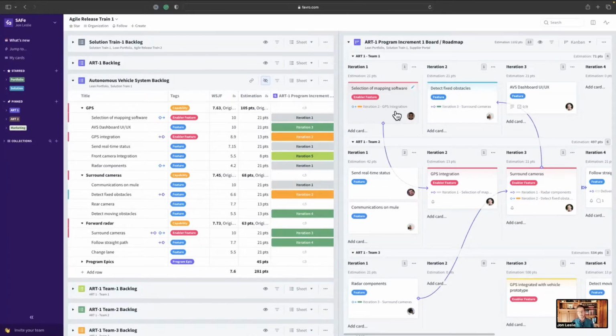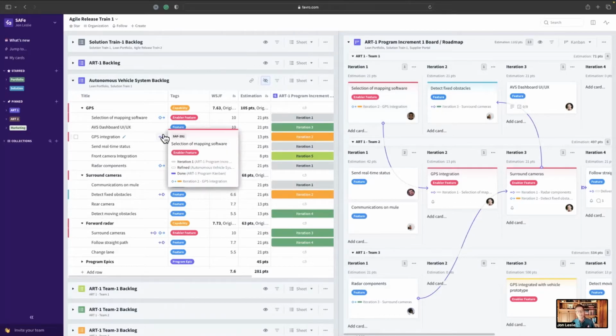Now, if you're doing proper Agile, then hopefully you're resolving those dependencies before they even make it to the program board, right? Through proper prioritization, whether you're using weighted shortest job first, or some sort of Moscow method, whatever the case may be. So making sure you prioritize around dependencies and also organize around dependencies.